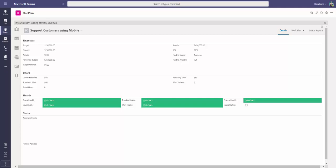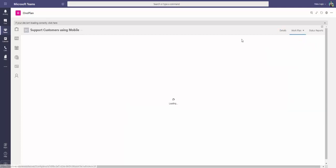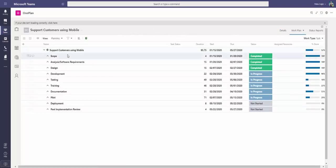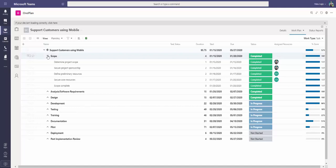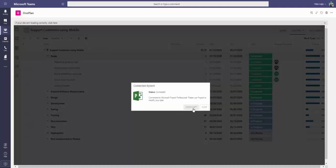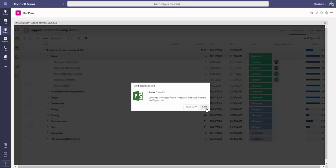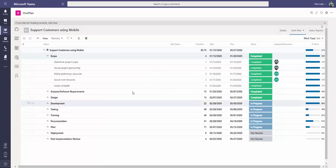In these plan details, we can also then go through and look at an overall work plan. And in that work plan, we can look at details around that and how we might schedule this out. In this particular case, we're visualizing the work plan details here, but it's based upon native integration that we have with Microsoft Project on the desktop, Microsoft Project Professional. As we can see from the icon here, this project plan is actually linked to a Microsoft Project plan, and its updates are coming from that project plan for a user that is preferring to use Microsoft Project as the source scheduling tool.